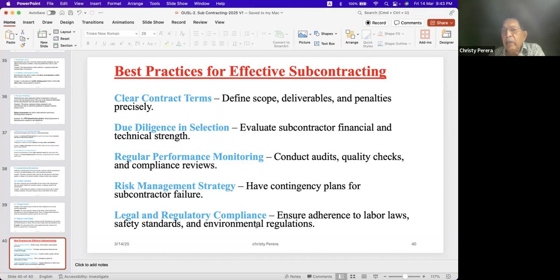But he can't touch the payment that we are making out of the provisional sum or whatever our arrangement is. They can't do anything. Sometimes I don't know whether the nominated subcontractor at a later stage will pay something to the main contractor because of his support and everything. But there is no rule for that. They can't touch it.